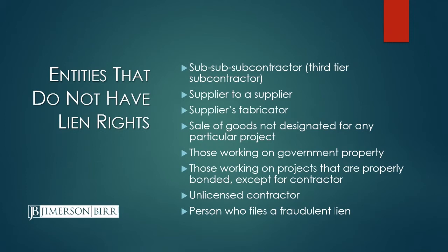Unlicensed contractors: if a contractor doesn't have the proper license for the work that it's performing, under the law it is going to have absolutely no lien rights. Now, if a subcontractor is properly licensed, or a subcontractor is working under an unlicensed contractor, that doesn't mean the subcontractor or the supplier don't have lien rights, but the unlicensed contractor itself will not have any lien rights.